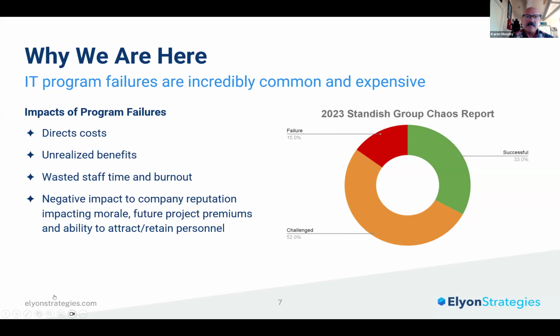From a data perspective, they had inadequate data validation for their data migrations and governance of that data in terms of policy, process, and the actual implementation of the data migration. They also faced challenges moving from their legacy environment to this new ERP system in terms of understanding the legacy environment and its capabilities, the algorithms, and things like that, due to challenges in the legacy system documentation and resources.